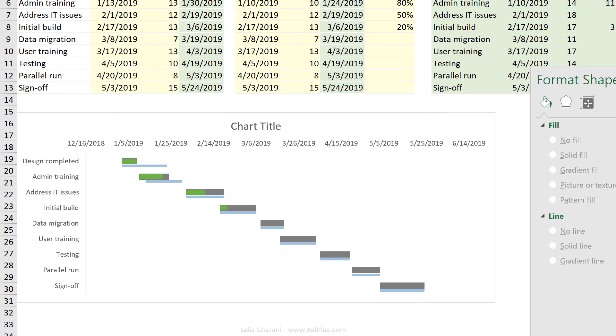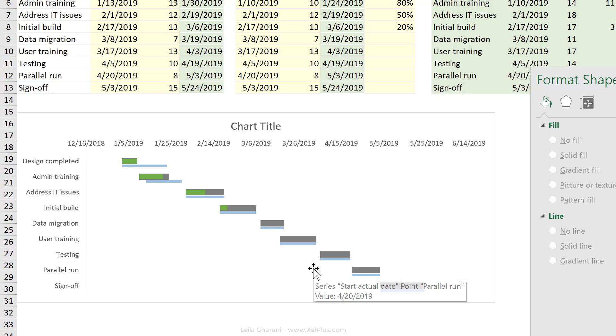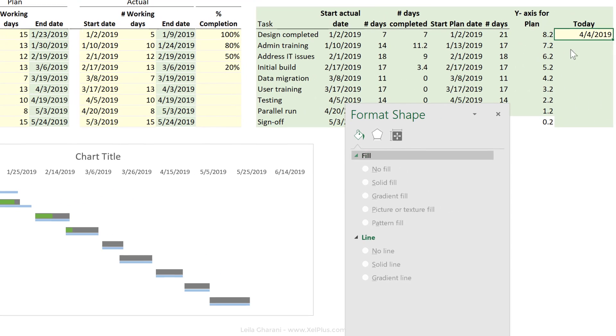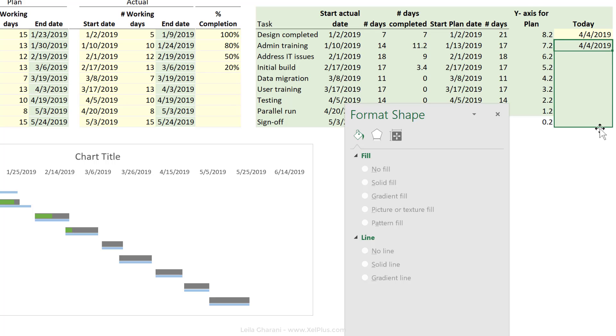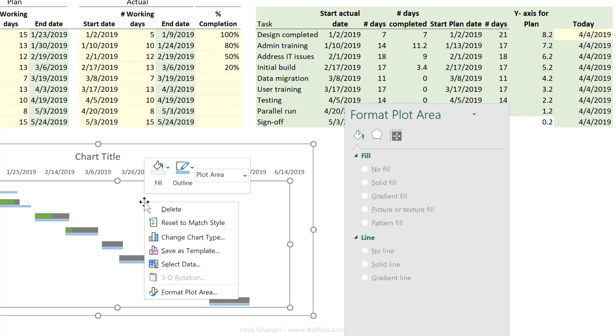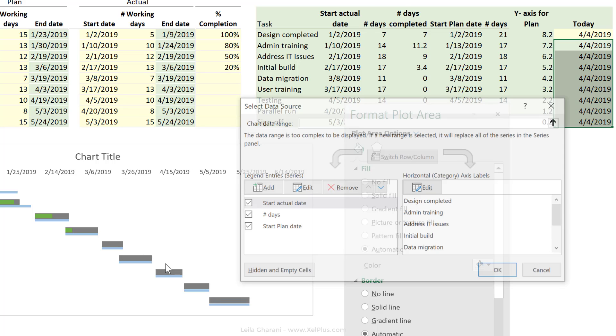I want a line right where the 4th of April is. This way I can quickly tell where I am on this chart and if I'm on track or not. So in this case, what I'm going to do is to also add a scatter plot. Let's just repeat this date for all these fields here. And let's just add this information in. So right mouse click, select data.